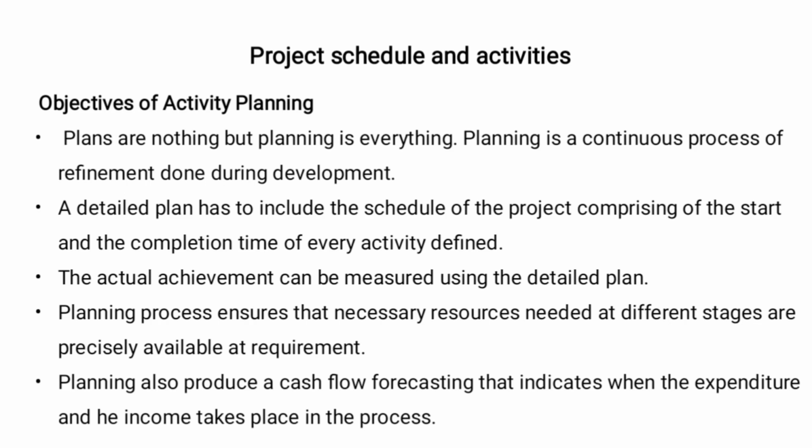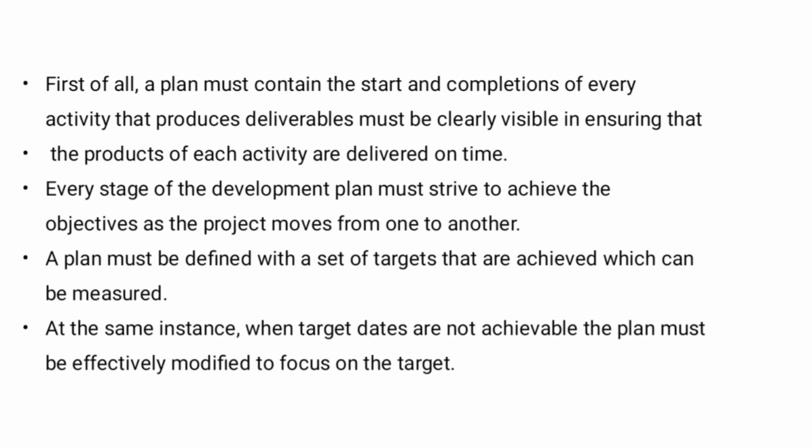Planning also produces a cash flow forecast that indicates when the expenditure and the income take place in the process. First of all, a plan must contain the start and the completion of every activity that produces deliverables, and these must be clearly visible in ensuring that the products of each activity are delivered on time.